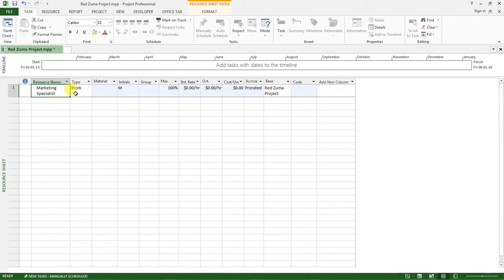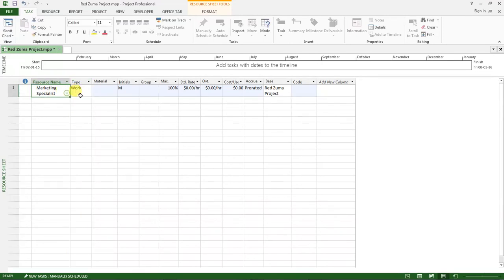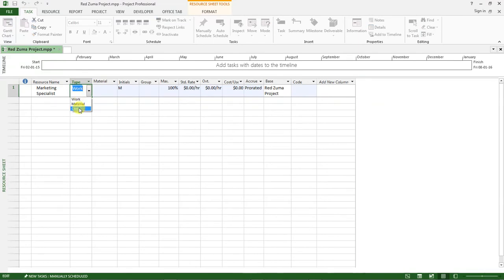I want us to concentrate on the column about Type. If you click on this dropdown list, you will find that you have Work, Material, and Cost — which are the three types of resources that we have for a project.